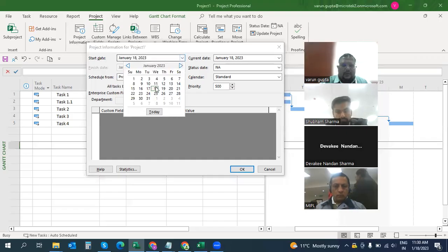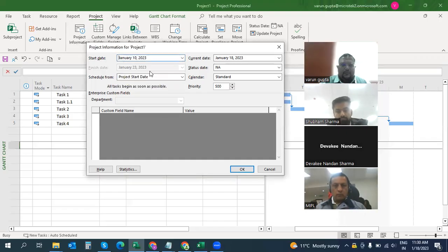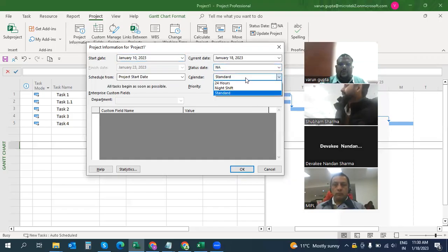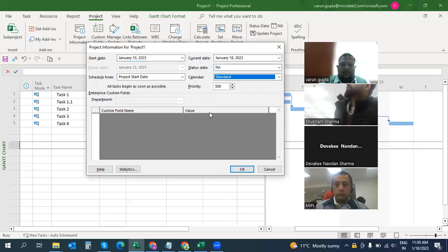So if I say start date is, let us say, 10th January, I can record my past project also, no? For historical information. But the current date will stay as today's date only. Status date will come as NA right now. Status date will come when you set the baseline. And for the calendar you can select from three calendars: 24 hours, night shift and standard. So this is the calendar.